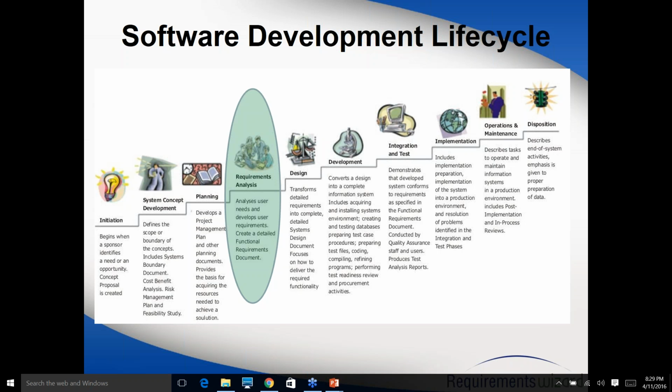So what we do is, in the real world, even when I work as a PM as well, we keep a buffer. So if we think this project is going to take me 4 months, I will tell the client it's going to take me 6 months. We will do some padding. And that's a very usual practice by PMs, to keep something in the buffer.